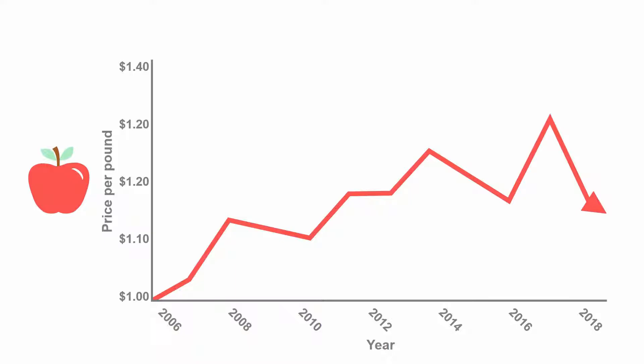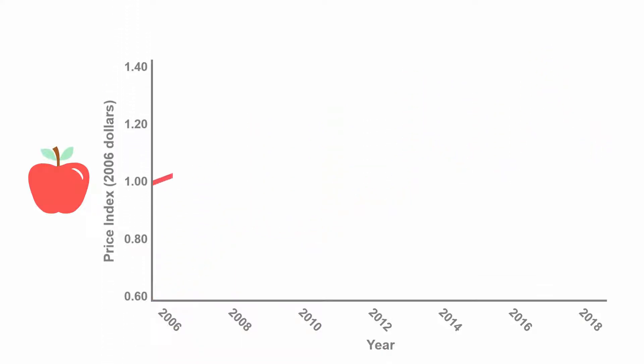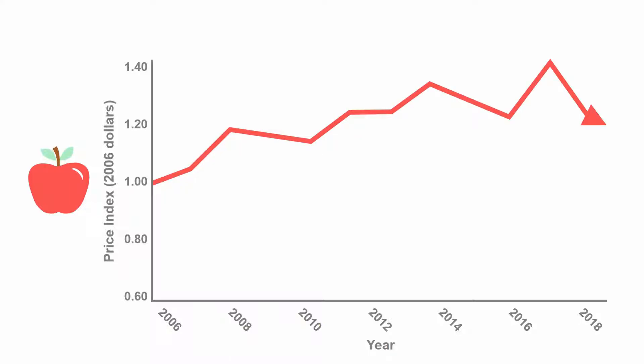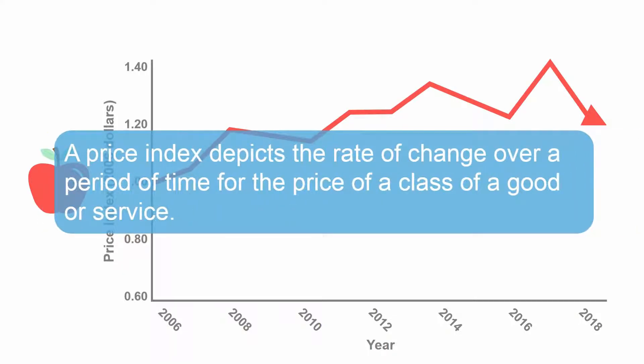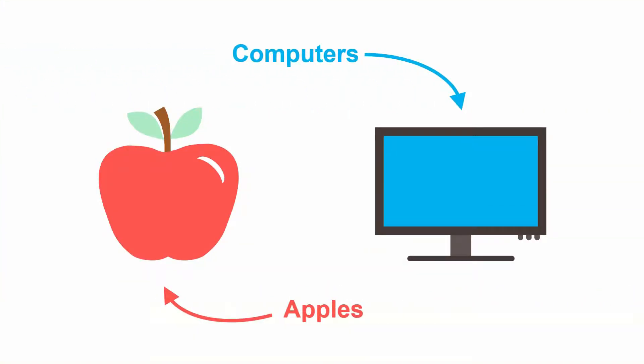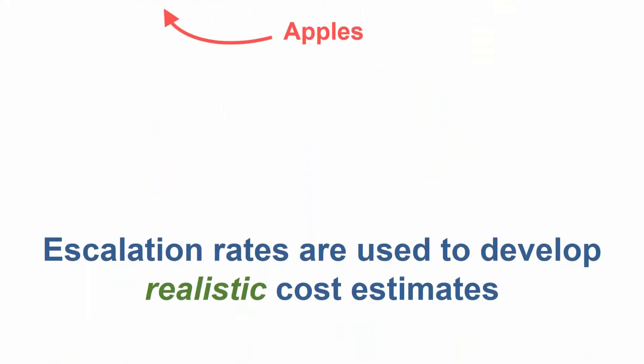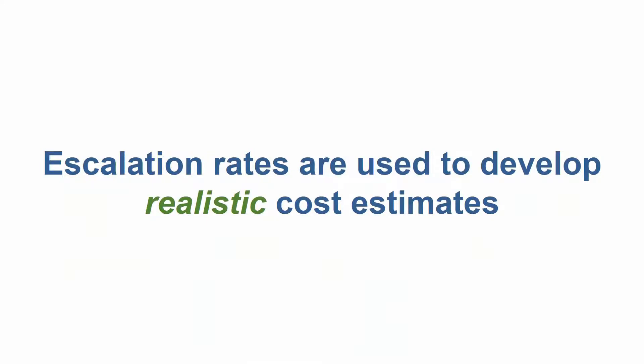Although tracking the observable price changes of apples over time is useful, an analyst may prefer to convert observable price changes into a price index. A price index depicts the rate of change over a period of time for the price of a class of good or service. From apples to computers, everything has a unique escalation rate. This also includes aspects such as the material and labor used to produce them. In the Department of Defense, escalation rates are used to develop a realistic cost estimate.